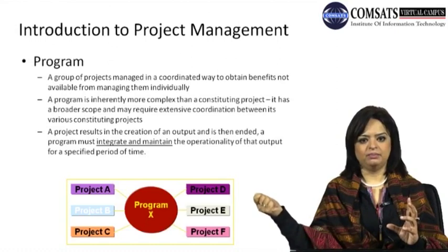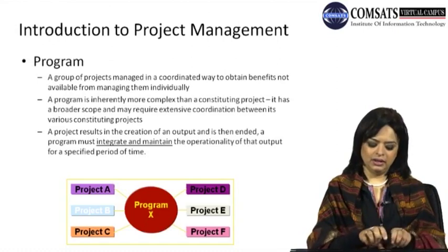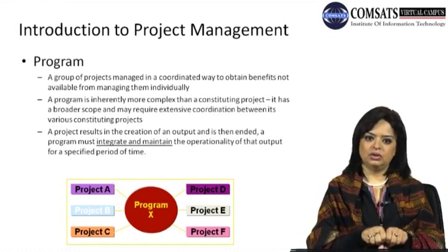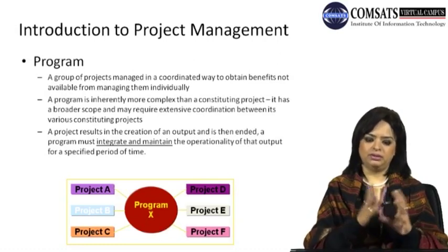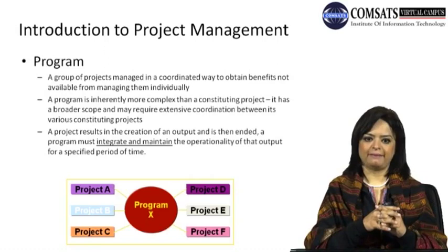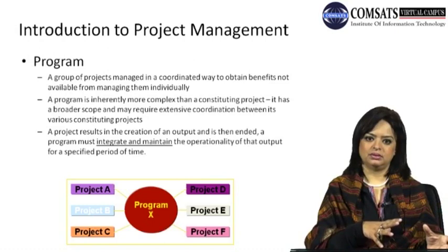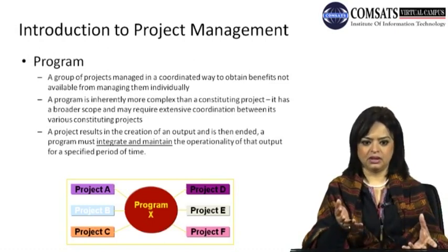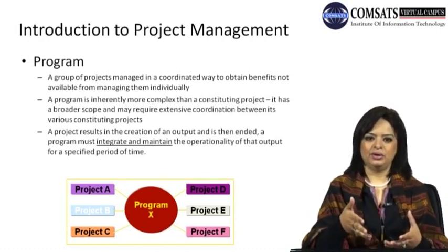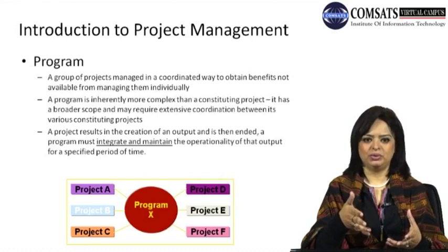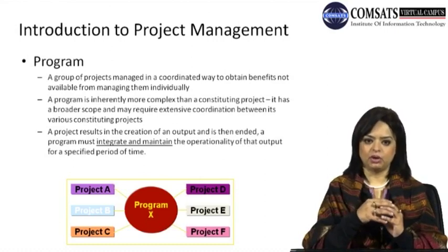You start off the supply from the main water line, and the pipes that were fitted were still not glued properly. Hypothetical situation. You start the main water line, and what happens here? Flooding. Unfortunate situation. This is the simplest example that can be given to you to understand why different projects have to be coordinated and timed properly.